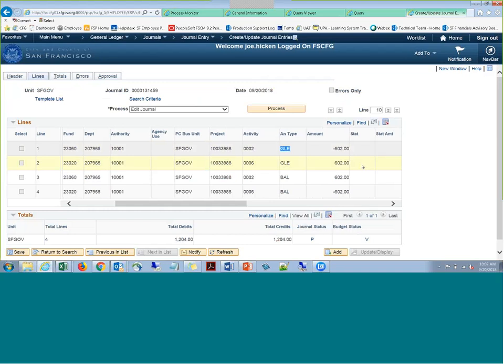And that's kind of a policy and procedure thing that we want to see, because you'll be able to report out of project costing, and even in the general ledger, on those transactions which were original costs versus abatements using these analysis types. You'll be able to slice out what was the original expense and what was the abatement based on analysis type. So thank you for flagging that. That was an error on my part. Now, functionally, the system sees them both the same, and so we'll still be able to run billing on this. But it's a best practice moving down the road to use MND for those abatements. Is that clear? Since I made an error here, I want to make sure that I'm extra clear on what that means, why I would want to do MND versus GLE.